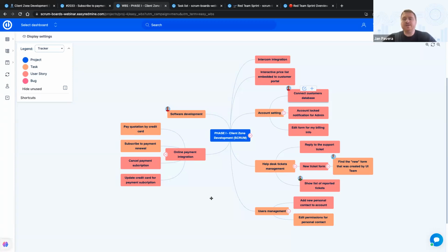We know that it is agile development, but in, let's say, a 1-year or half-year long term, you definitely can use some techniques from waterfall project management, use the roadmap, use the milestones to know what must be done in some part of time, and then you go with it to the backlog board, and you are more agile there, trying to deliver the most valuable part of the stories and review it for each sprint with the clients to know that you accomplish the roadmap and the milestones, but you focus only on the most valuable and important thing, which is the basic theory of agile development.